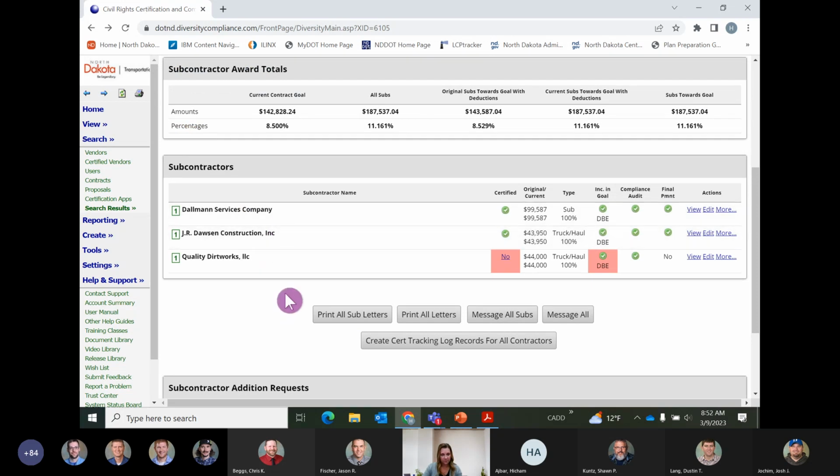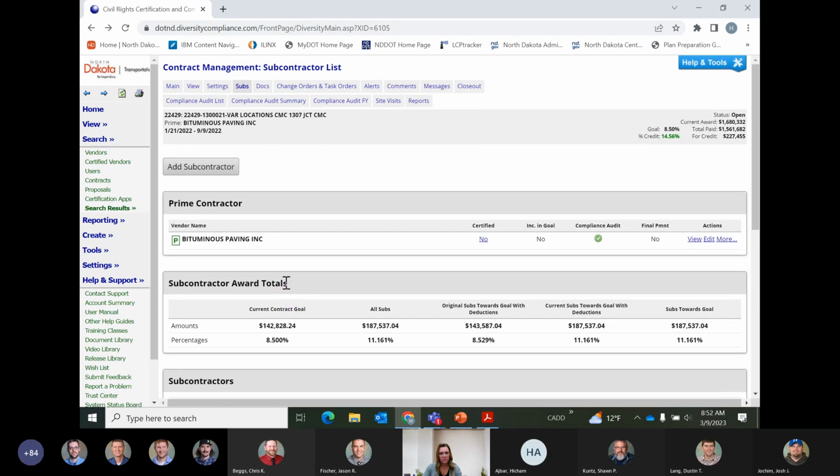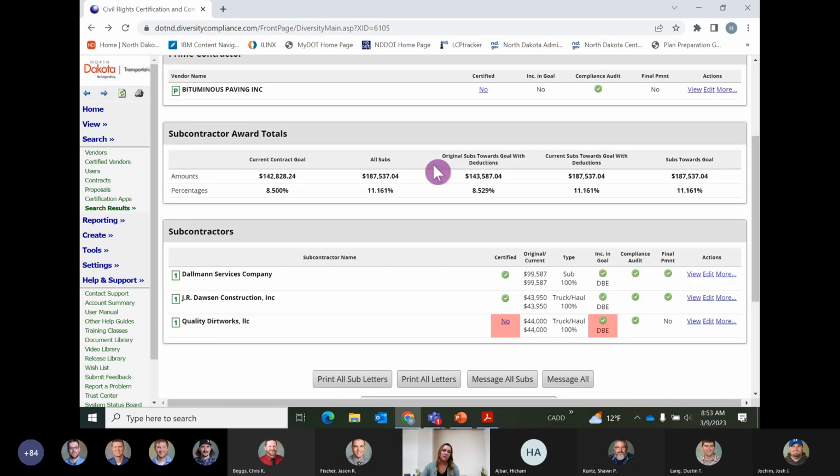Oh, I also want to say too, at the pre-job, it's probably a good idea to have this conversation, but the prime contractor is the one in charge of entering the subcontractor information. Civil rights will set up the prime and get the contract set up in the system, but just make it clear to your prime that they're in charge of entering the subcontractors. And you can see right here, it's a simple click and then it'll prompt them to fill out a bunch of fields with all the information. But they're in charge of adding them throughout the project too.